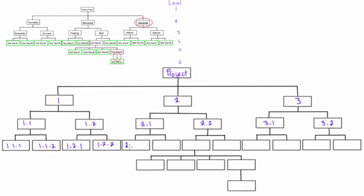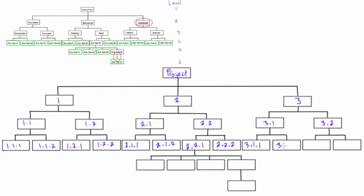So we get 2.1.1, 2.1.2, just like that. Here we'll do this one - this would be 2.2.1 and then 2.2.2. This one, when we carry down the 3.1, this would be 3.1.1 and this would be 3.1.2. So it's super repetitive, but I hope you see what the pattern is. We carried the 3 here and added .1, .2. Then we carried this 3.1 down here, added .1, .2, etc. So we'll carry this 3.2 down to here.